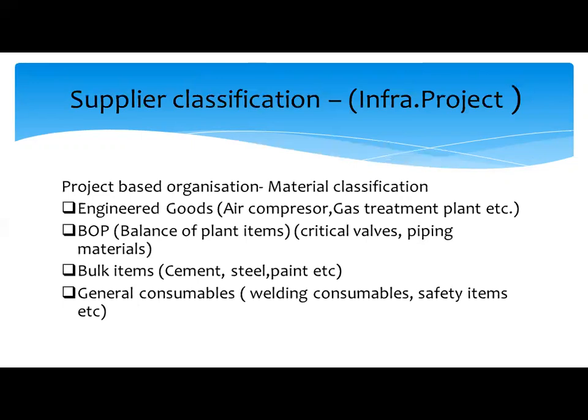Our Planning Commission had pledged to invest $1 trillion in mega infrastructure projects during the period 2012-2017. As per the latest reports by the Ministry of Statistics and Program Implementation, 245 infrastructure projects have been delayed, and 340 projects have had cost overruns. Reasons could be many: delay in project financing, ministry clearances, delay in finalization of detail engineering, delayed ordering, supply pre-commissioning, contractual issues with suppliers due to change in scope, etc.